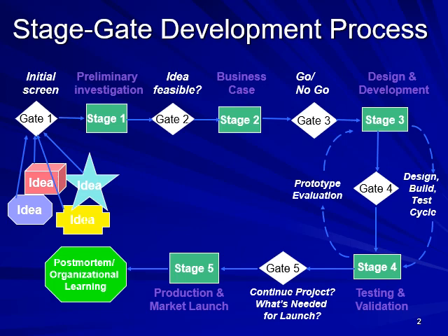So you'll have a set of people, oftentimes cross-functional teams that include people from engineering, marketing, and operations that have a good understanding about the business that is trying to develop the new product. Based on that, there is going to be a set of criteria that determines whether these new ideas are going to move forth into the following stage, which will be feasibility, right? So before you actually move into the feasibility study, you're going to determine which ideas are going to move forward, okay?